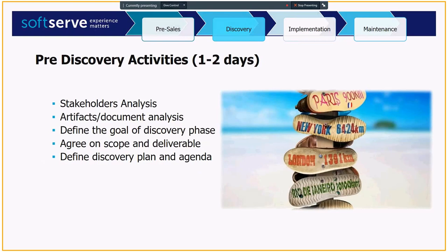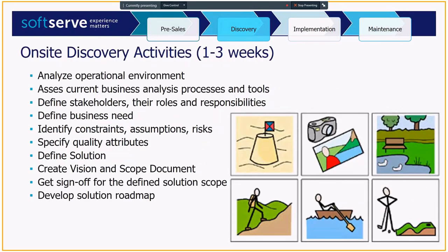So then we have the on-site discovery activities. During this time, we usually go to the client premises. We try to analyze the processes, analyze the whole environment, define the exact stakeholders. During the pre-discovery, we've done the stakeholder analysis. So we've drawn, for example, stakeholder maps, and tried to define the impact of all the stakeholders.